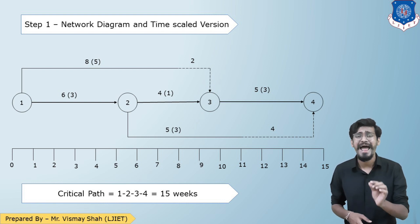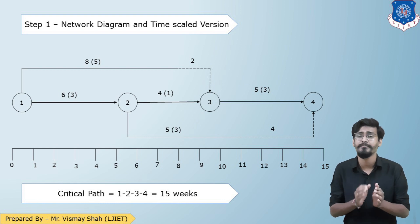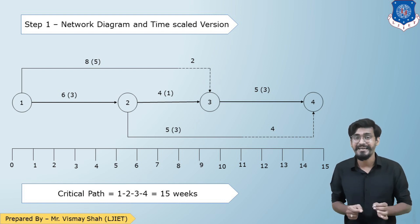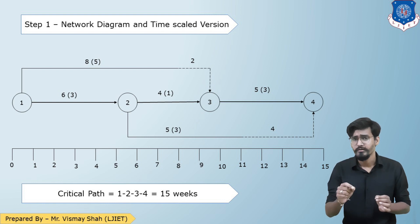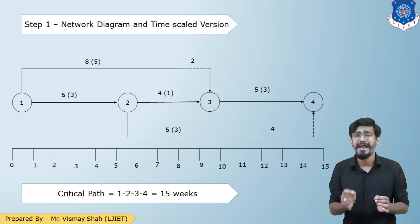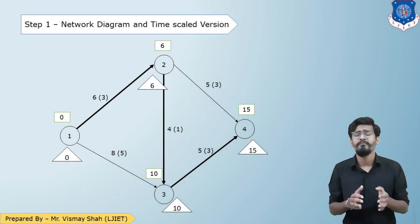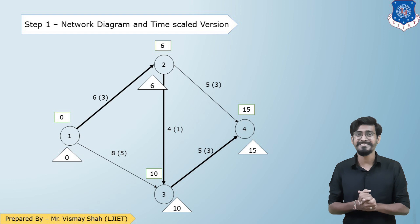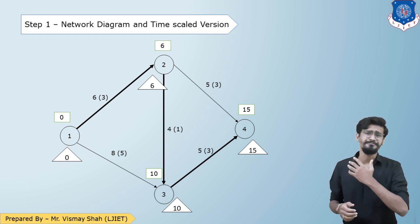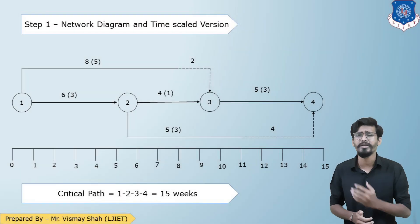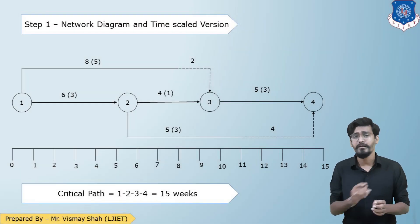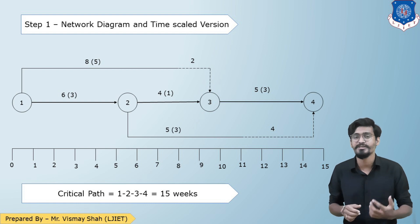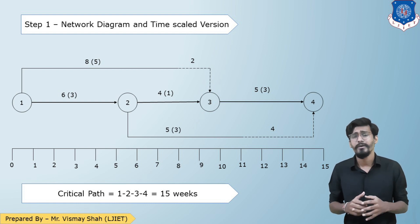In the time-scale diagram, activities 1-3 and 2-4 have a dotted or dashed line — that represents their float. For example, activity 1-3 has a direct duration of 8, but via the critical path 1-2-3 the duration is 10. So the remaining 2 is the float. A similar situation applies to activity 2-4.